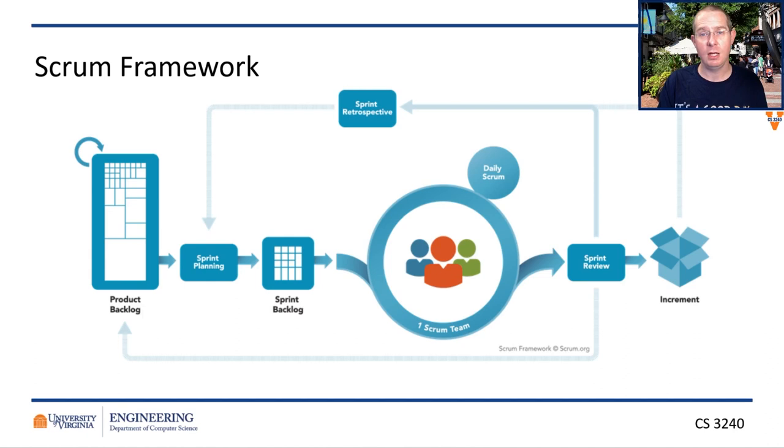So you review. How did we do? Well, it looks like we were able to accomplish this much work. Okay. During the next sprint, we know that Manuel and Judy are going to be gone for a week. They've got a vacation coming up. We know Adrian is going to be busy, but we know that Sarah and Alvaro are coming back from their conference, so they'll have more time. Okay, so I think we can accomplish maybe this much work.